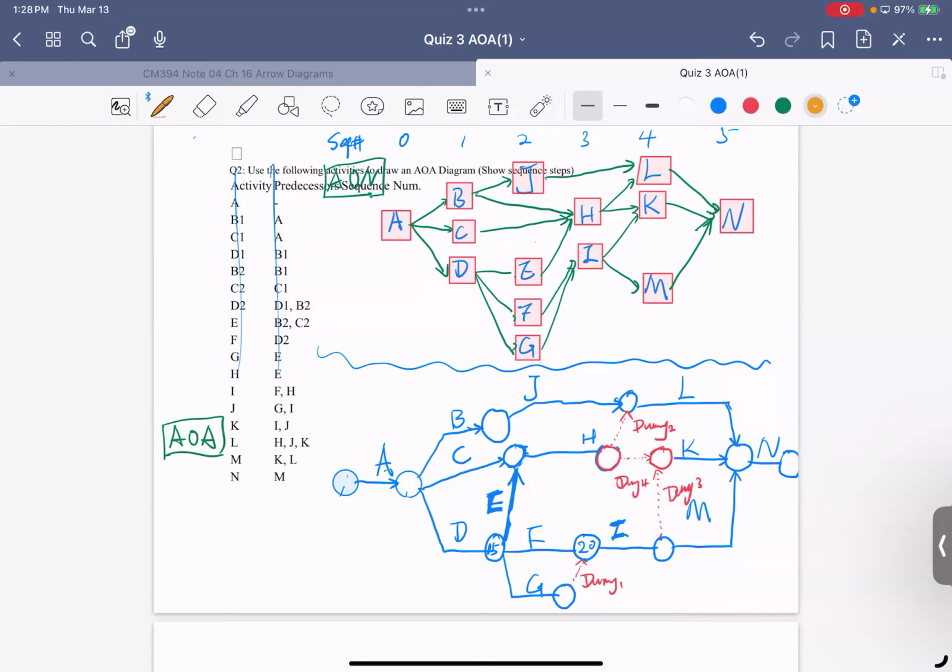So we will do 1 for the first one and then 5 for the second one because we want a gap. And then in that case, you will have a 10 here. And then maybe you can put a 9 or 11 here. And then this one actually will be 11 or something, 8. It doesn't matter.